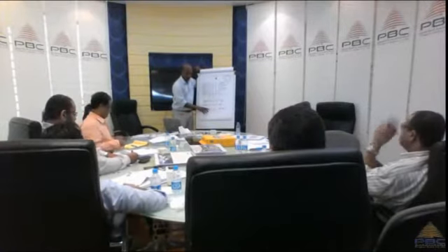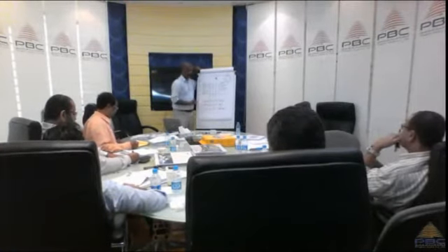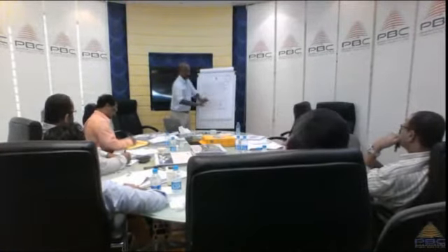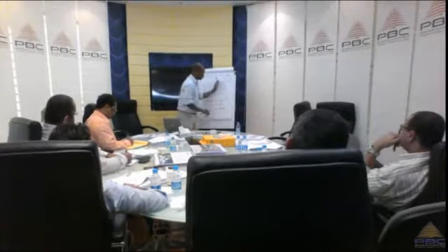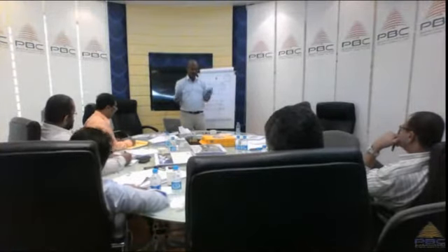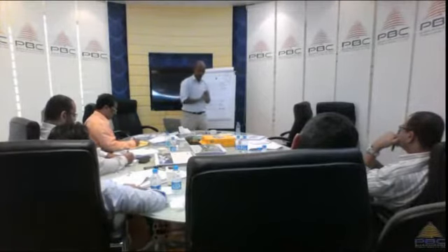Earned value: we forget about how much money we spent and what our plans are, what we're supposed to do. We will just concentrate on the site and see the value of work actually created. So we go on site and we see a full side of the fence completed, 75% of another one, and 25% of a third one.